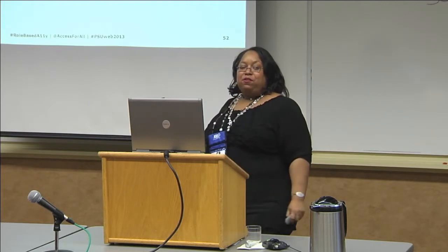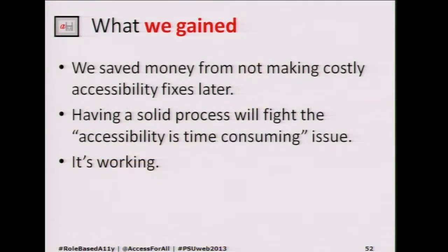Now, what did we gain from this? Well, we saved a whole lot of money because we weren't waiting until after we had chosen our technologies, after we had chosen our platforms, after everything was built.